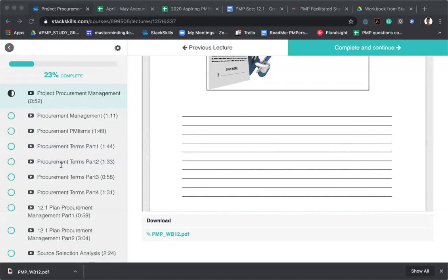If not in the contract, then a formal change order needs to be issued. If it's in the contract, it must be done. A formal change order to the contract must be issued, canceling it. Changes must be submitted and approved in writing. Contracts are legally binding by both parties, and contracts should diminish project risk. That's why we have it. Basically, when we transfer risk, this is why the contract is important.